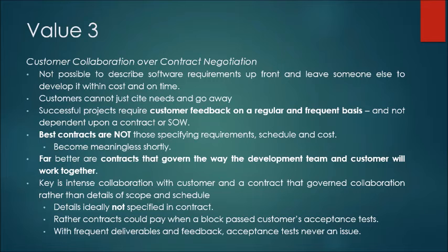And then we suggested to the customer that you pay per hour, because this is only a starting guide. True, there might be change because of the changing needs, because of the time, and therefore it is better that you accept a methodology where you pay per hour, and we meet every 15 days or 30 days to discuss what we developed so far, what next, and is there any change required in the existing one. The customer agreed.